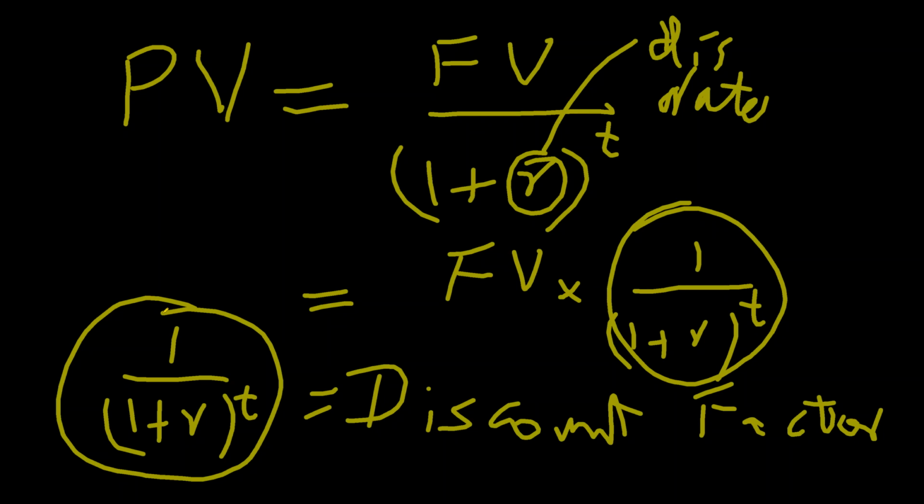Similarly, the another 10,000 which I'll get after 2 years, what is the present value of those? I find that it is like 8,000 something. So the money which I get late into the future is less today. Therefore, the net profit thing is not good because net profit was not considering the future value of the money. It was considering the face value of the money. Now, if I can somehow calculate the future value of the money, I can then sum up and find the net present value of my project, the total net worth in present value terms, in the terms of aaj ka paisa, today's money. So that will actually change the whole situation.